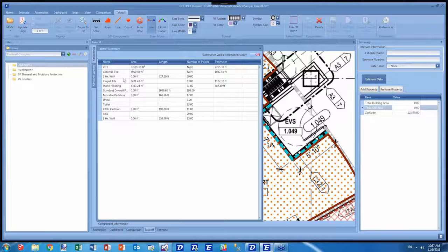And then you can tie your quantities to, in this case, all carpet tile on all floors from this quantity. That said, we are actually going to have a little bit of a different type of functionality than you may be used to, to help better support our auto costing that'll be coming up in the future. And the way that that's going to work is if I select, in this case, drawing objects, a carpet tile on multiple floors, and I apply a cost, what it will actually do is it will individually apply those costs to each of the carpet tiles.